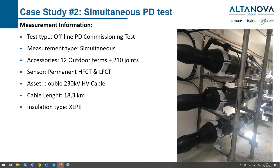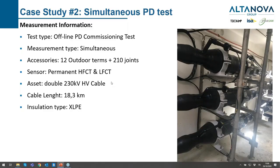This is another case study that in my opinion is very important to share, to make everyone aware that even very large circuits can be tested with partial discharge efficiently. It was a very long 230 kV cable — 18.3 km, a double circuit, so we had 12 outdoor terminations and 210 joints. It was one of the longest cables in that utility. It was equipped with permanent HFCTs and low-frequency current transformers for synchronization purposes.